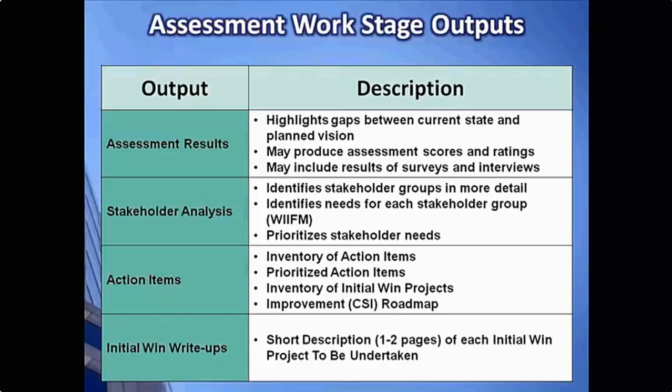Note that it's very important to combine what our stakeholders are looking for with what the gaps were that we found during our assessments in our process, technologies, organization, and governance. If we don't do that, what we will end up with is a large inventory of findings, and it will be very unclear in terms of where we should go next. This is a very common mistake and an error that a lot of people that do implement tend to make.